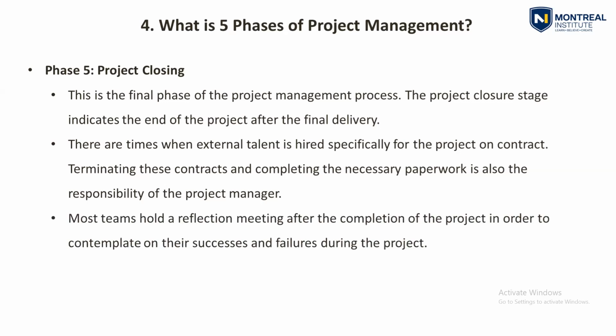Most teams hold a reflection meeting after the completion of the project in order to contemplate their successes and failures during the project. So this is the lesson learned meeting that will be conducted after every project's completion. Some construction teams will do this, but most of them will not, because the team will be demobilized before the end of the project. So there will be no team, maybe 2-3% will remain at the end, so no such meetings will be held.